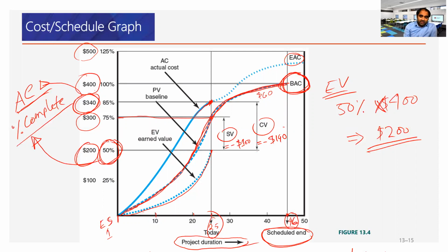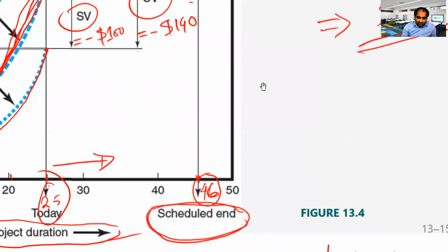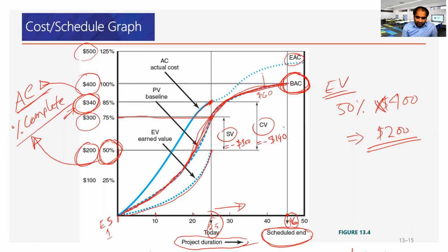So if it is 50% here, let's just double the number. We cannot simply double the number because there are many other factors involved. If you look at the initial plan value, this is not a linear curve. There are specific factors involved at each time step of the budget, with the work packages involved in those times. By considering those factors, we can now have the estimated cost at completion, which is the refined budget, at somewhere here below 500K.